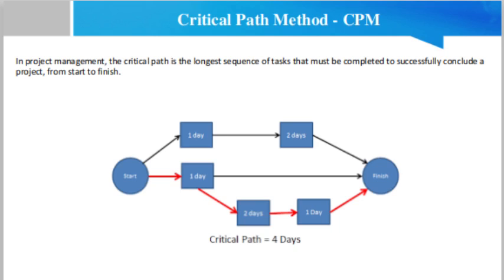The critical path method, also known as critical path analysis (CPA), is a scheduling procedure that uses a network diagram to depict a project and the sequence of tasks required to complete it, which are known as paths. Once the paths are defined, the duration of each path is calculated by an algorithm to identify the critical path, which determines the total duration of the project.